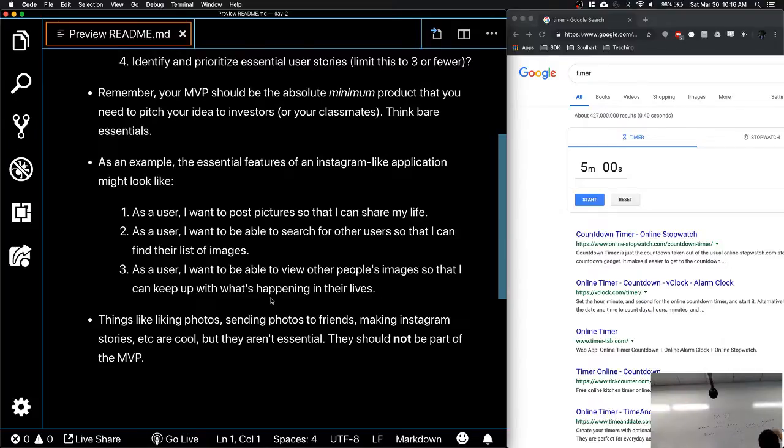That's your task. So you'll say, as a user, do something, okay? And then the next sentence is, why? So that something else happens. That's usually the template. So as a user, I want to post a picture so that I can share it with everybody else. Okay, and again, this is mostly in simple, normal English language terms.